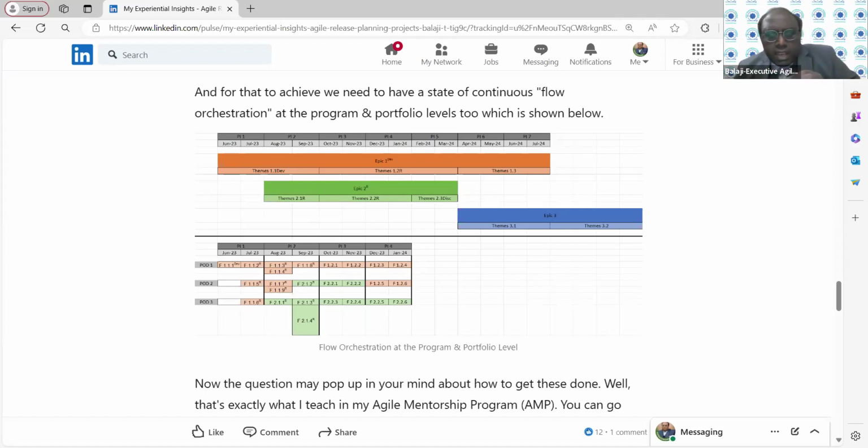Now, in the middle of May, I need to have visibility till August. That is the meaning of rolling wave: 3 months of backlog, factoring in the cone of uncertainty, and also using an approach called progressive elaboration, as the concepts of agile and lean say. So these are the things you need to keep in mind.